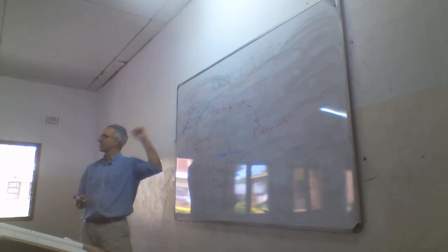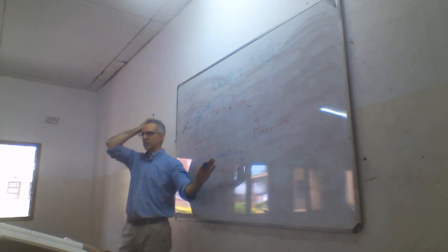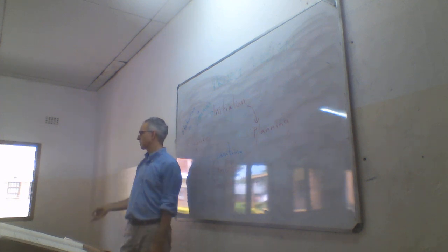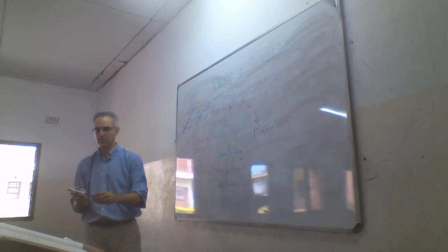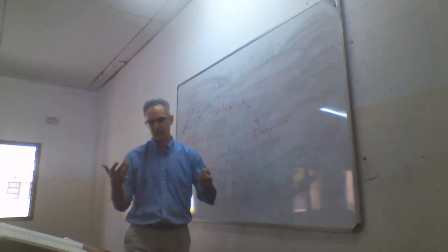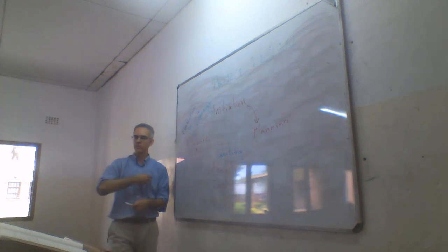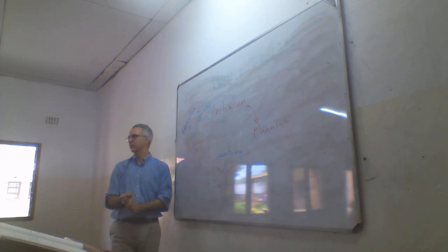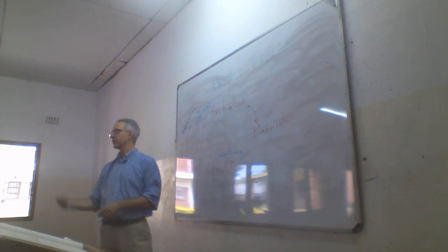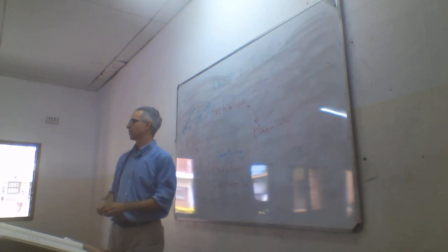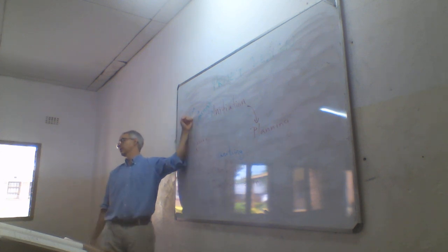Evaluation, you can only do at the end of the project. Sometimes you do one mid-project. If it's a very big, long project, you might have a mid-project evaluation. But it's a bigger thing where you measure how the results are so far, right? But more meaningfully, the evaluation happens at the end of the project. So you monitor during, you evaluate after.